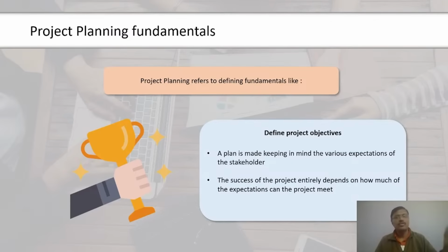In the second step, we will select the entire second column. After we have selected this column, we will go to the Insert tab. In the Insert tab, we will go to the bar columns, and in this, we will select 2D stacked bar charts. Now we have the entitled bar chart in accordance to our data on the screen.